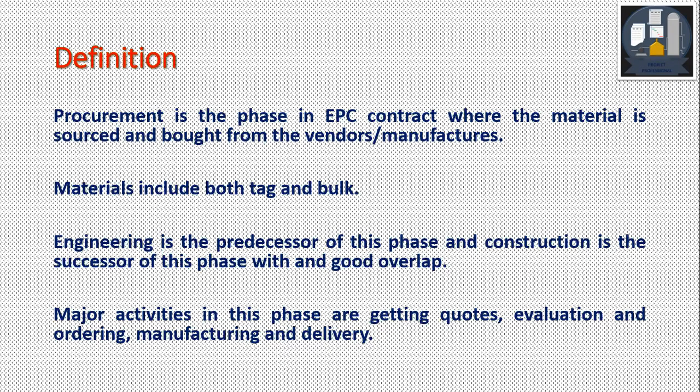Engineering phase is the predecessor of this phase, while construction is the successor of this phase, and there is a good overlap between all the phases. Major activities in this phase are getting the quotes from the vendor or manufacturer, evaluation, we also call it technical bid evaluation, TBE, and ordering, that is issuance of purchase order.